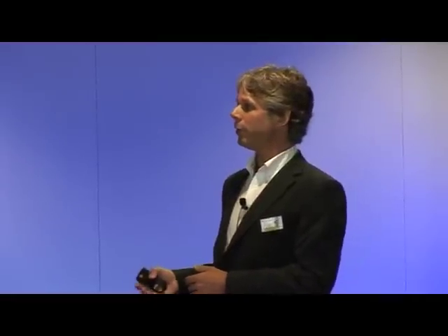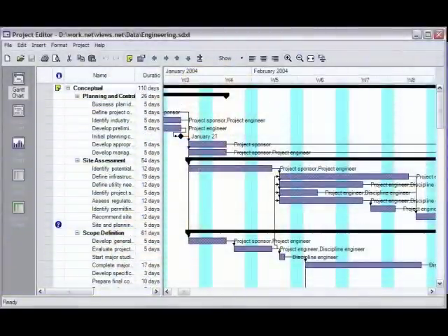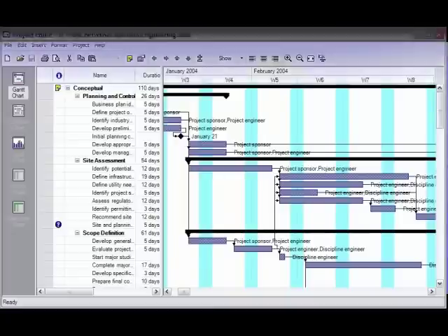For the R&D organisation, in 18 months, they saw the project being complete when they'd got the wound care product submitted to the regulatory authorities for approval. But the marketing guys had a very different perspective. They saw that in 18 months' time, they would have products ready to go into the pharmacies, into the wholesalers, ready for patients to actually use. But these two teams never talked to each other.